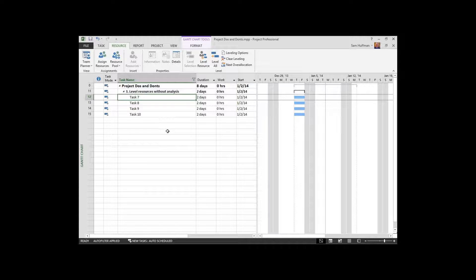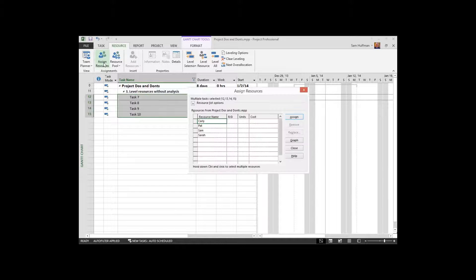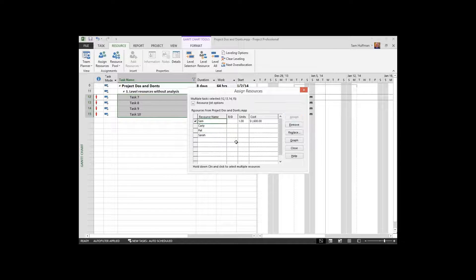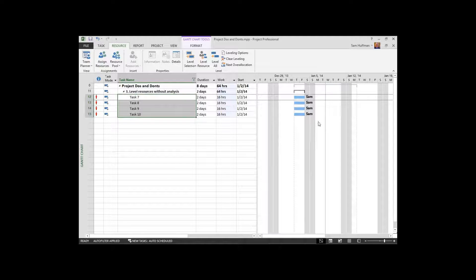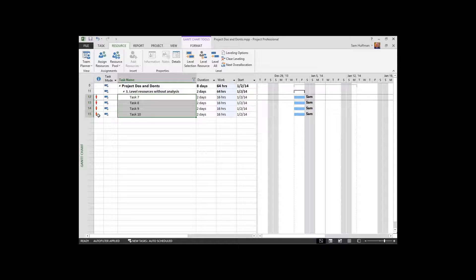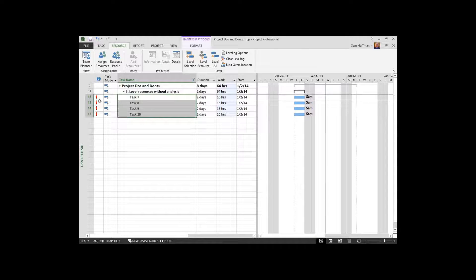Let me show you this. Just going to use the tasks themselves, no summaries, and I'll assign a resource. Again, I'm going to assign myself. The resource me working on four tasks concurrently has driven the over-allocations and project is happy to tell me what the problem is that the task is over-allocated.